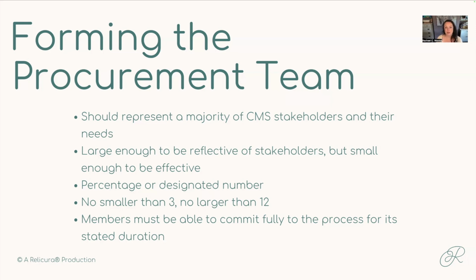If you're a larger museum and there's any sort of data migration that needs to happen as a part of the CMS procurement and implementation process, you're looking at least 6 months to a year for that process. There are, of course, going to be fallow periods during that time because not every timeline is up to your organization. If you choose a proprietary product, you're also working with the vendor schedule. So there may be some hurry up and wait scenarios as you go through the 6 to 12 months for that implementation.